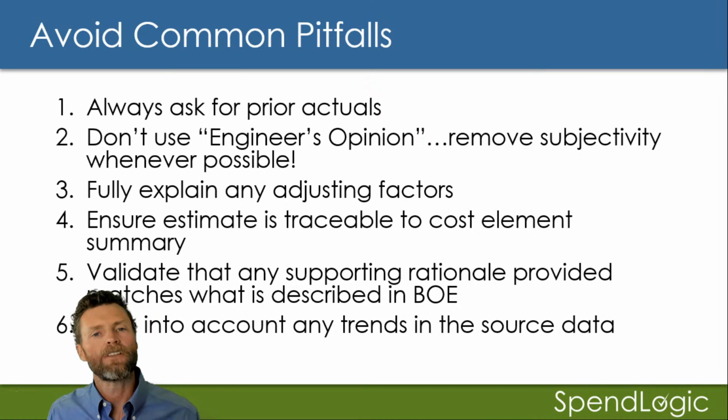How much faster are they doing it each and every time? So if you've got hours by unit, throw it on a graph. Okay, that's the easiest way to do it. And you can even use Excel tools to then add a trend line to that. And now you've got your own improvement curve, and you can apply that to future production as well. So whenever you get the chance, look for trends in the data, and don't forget that a great way to do that is to put it onto a graph.